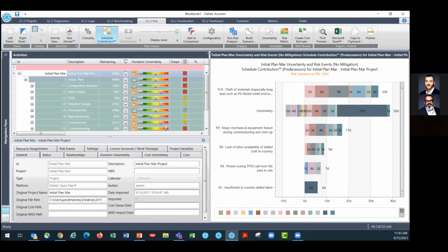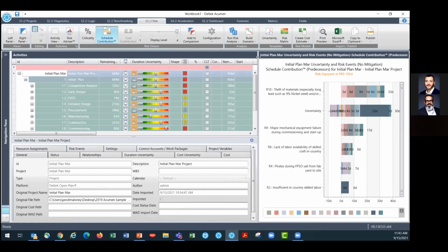So just to explain what I've done and show you some of the reporting that you can get out of this, because I think that the end in mind is really what I want to make sure to highlight here. I've taken my schedule, looking at the remaining durations. I've assigned uncertainty throughout the plan, and I did that using what we call our duration uncertainty sliders. These are basically setting 3-point estimates on each of my durations based on how we feel about their potential performance.